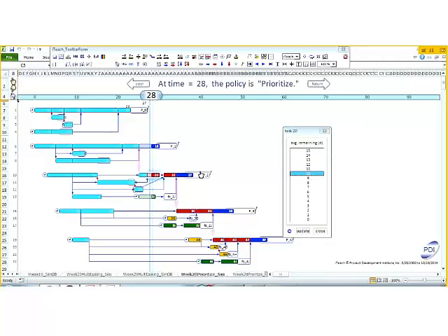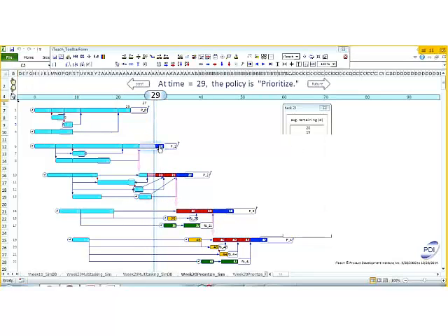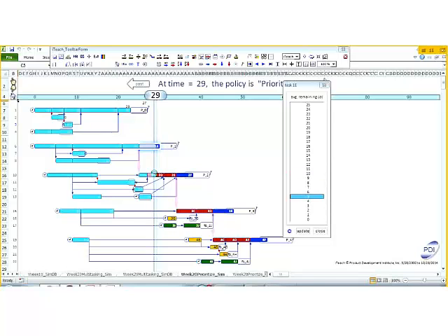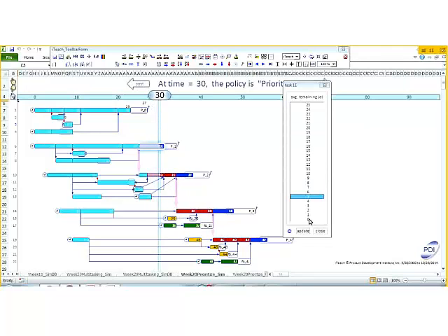Now, in the real workshop, we throw in an urgent field problem. So we have a little unexpected work that we throw in there so we can show that the buffers absorb that unexpected work. And it really has no effect on the projects because we use the green and the yellow resource. Spin for week 29. That's all that's active. Spin for week 30.